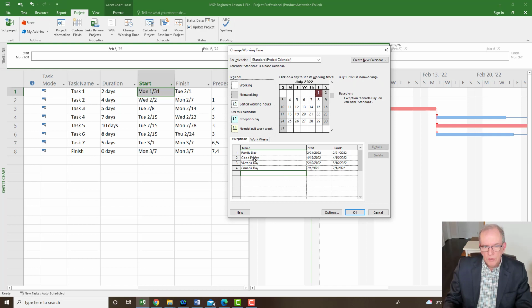Okay, so actually I'll do one more. I think it'll make it a little bit more interesting as I talk about it. We have a civic holiday, which is usually the first Monday in August. And I'll click over here. And maybe I'll do something a little bit special just to show you something, like the Christmas holidays. Depends on your project, right? Some companies, like in the construction world, there's not a lot that typically goes on between Christmas and New Year's, to be honest. Some companies do work, right?